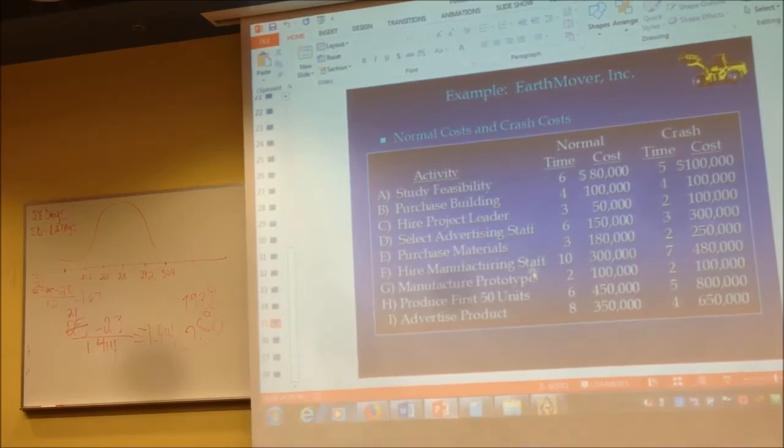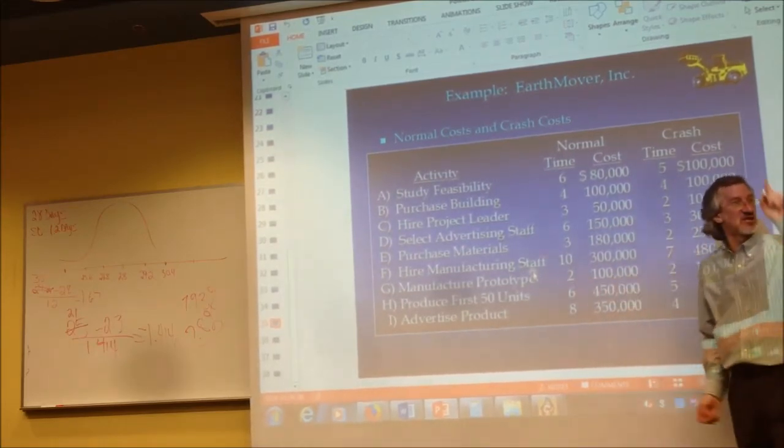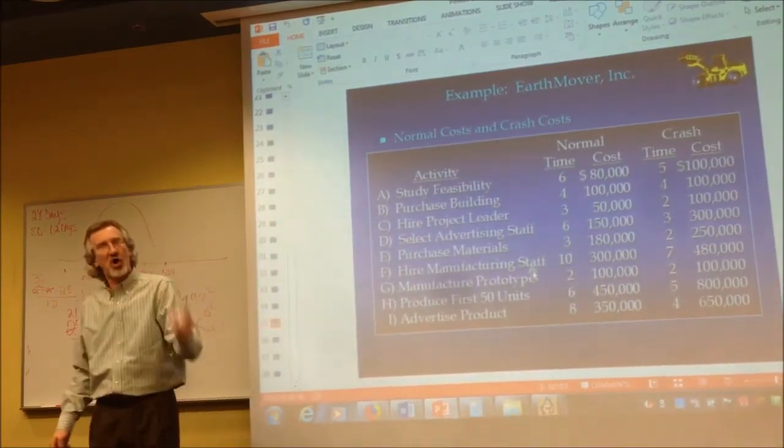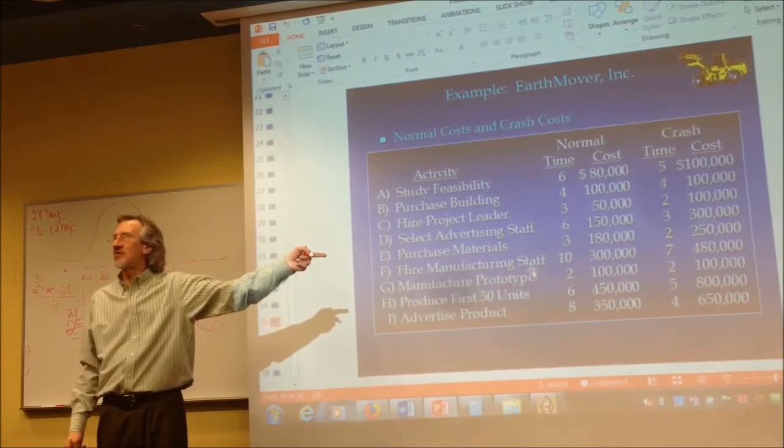You would do that. Let's go to the bottom one. 4 units of time, additional cost, what is that, 300,000? Take 300,000 divided by 4 per 1 unit of time. Calculators. 75,000 per 1 unit of time on that one. So it's just taking the total amount of cost divided by the number of units, to find that 1 unit. By finding the cost per 1 unit, you're just basically writing your objective function.